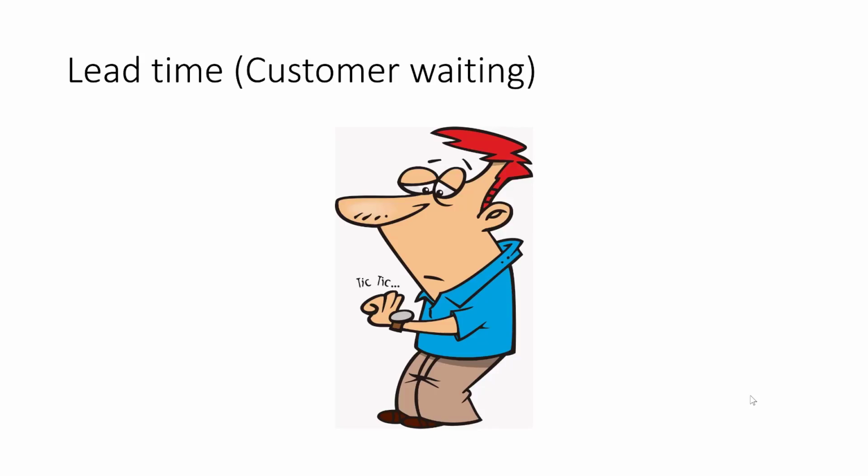But essentially, it's how long does it take for a thing to go through a process, a thing to get done. Lead time is essentially, you can sort of look at it as the cycle time for a customer, only it also includes how much inventory is in the system. So lead time is customer wait time, essentially. If I was a customer and I made a request, how long would it take for me to get a response, to get my product delivered, right? So that means how long does it take to go through each step, and given the inventory that's in process, right, how long does it take to actually go through the whole thing?